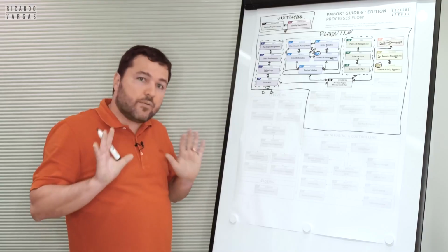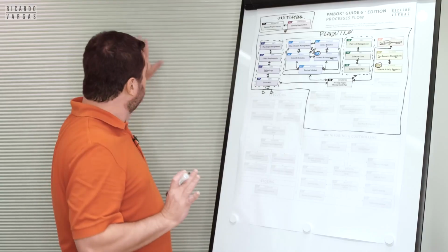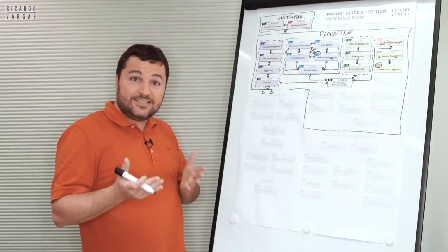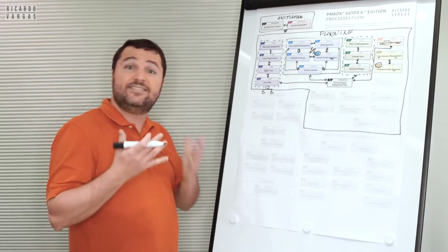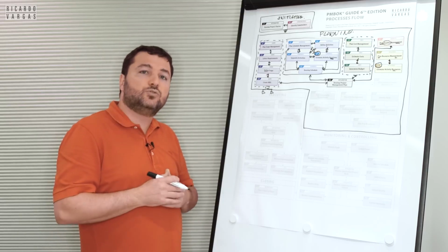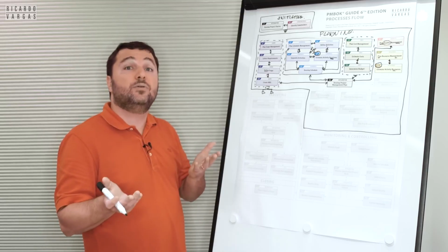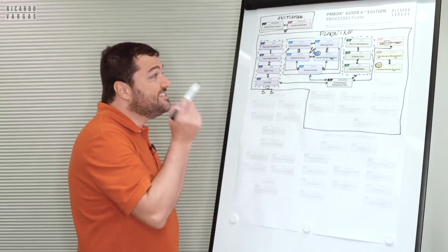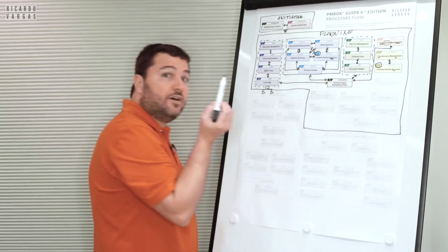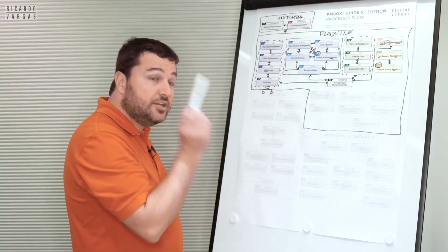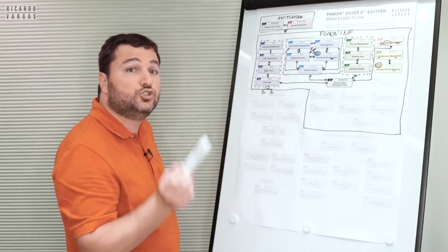Let me give you a very simple example. Let's take this wall. Say one worker can build this wall in 10 days. It's reasonable to say that 2 workers can build it in 5 days. So this is exactly what I'm talking about here, because most of the tasks, I'm not saying all, are effort-driven.